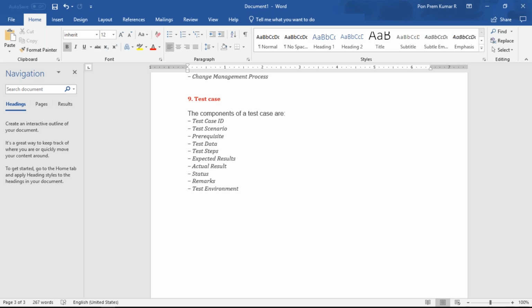3 columns. The first column is date, followed by change request, then either the BA owner name or the project manager's name. That's it. Or you can include 4 columns: date, followed by change request, BA status accepted or declined, and then the project management team. That's it. It's internal, but the more documentation you have, the easier it is to work on the processes. So these are the best practices. Change request logs.